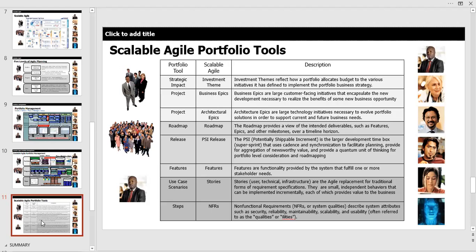And in Agile, we're really not even dealing with durations anymore, because sprints are two-week sets. They're already preset. And again, in Agile, your schedule dictates your scope. So you're pulling stuff off your backlog that you can fit into your sprint, based on how you've identified it based on story points. Okay, we've covered all those, so I can't go through that again right now. But as we go through, I want you to see where, in the Agile world, we call them epics. And there's business epics and there's architectural epics. Obviously architectural is the structure of your institution, and the business is what you're trying to accomplish.